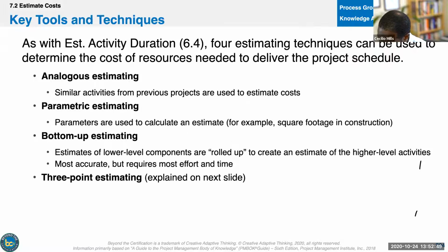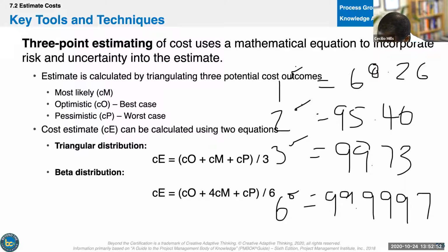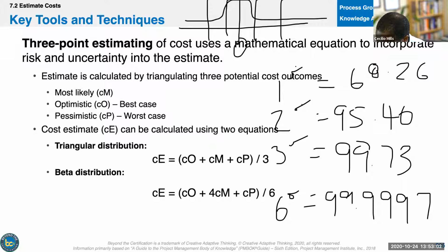So now we have these, we found our number. And go forward. And I'll draw another little one here. We found our number and we have our little curve like that. And then we have these lines, 1, 2, 3, right? So you have your middle number and then you have 1 standard deviation, 2, and then 3. So what we do is we say here, okay, Karen's going to take Bart. It's going to take her on average, I think we came up with 122.5 minutes. So that would be that number there. And then we did (P minus O) divided by 6, and we got, I think, 17.5. So let's just call it 17.